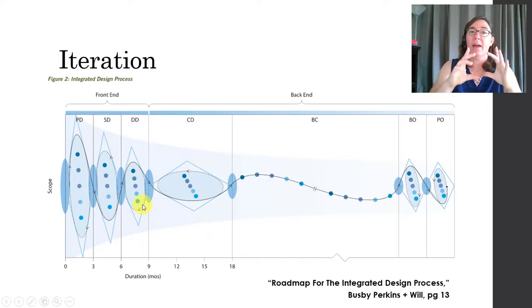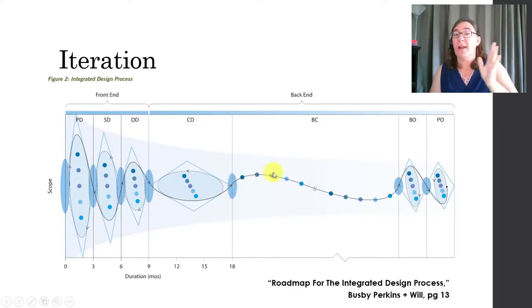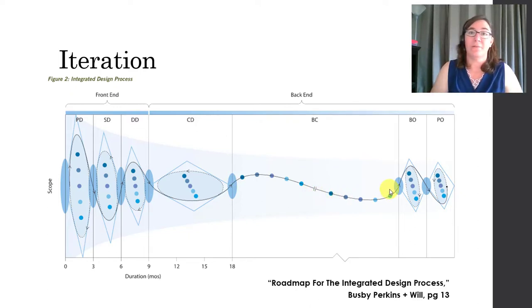And you can say that the diagram is trying to show you that the different designs, the different disciplines are getting closer and closer in coordination. All right, you can see that the cyclical aspect continues here. Construction's a little bit different. We try to do a more linear process in construction, all right, because of how that physically works. All right, so that's what the feedback loops and iteration looks like in an iterative design process.